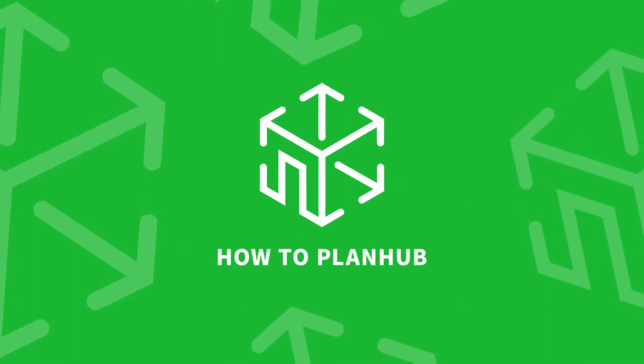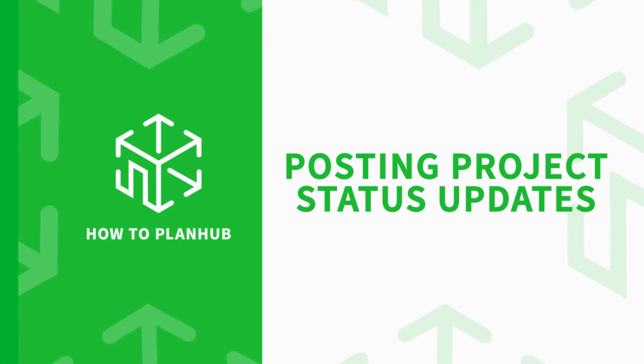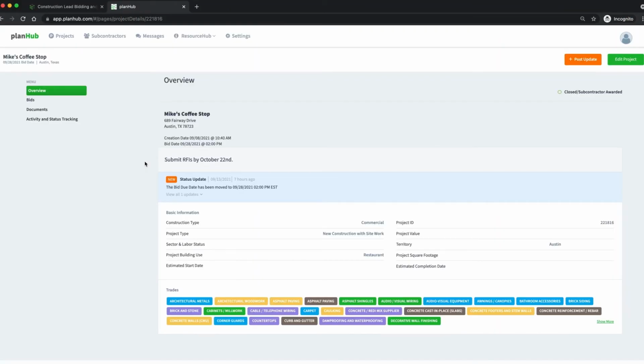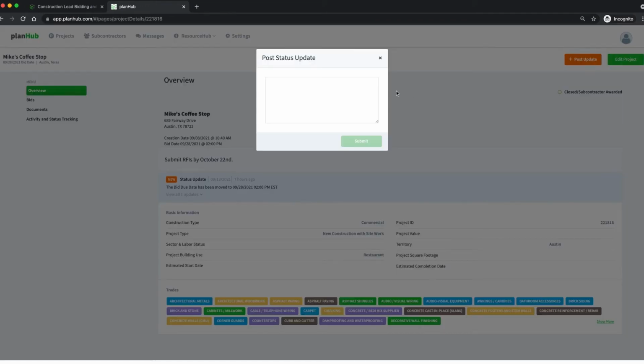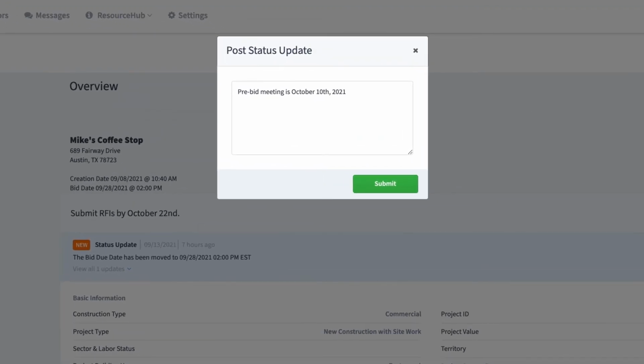In this video, we'll show you how to post a status update for your project. Let's get started. On the project board, click on the project you'd like to provide a status update for. From the Project Overview page, click the Post Update button. This will bring up the Post Status Update message box. Type in your message and click Submit. All subcontractors will then receive an email notification with your message.